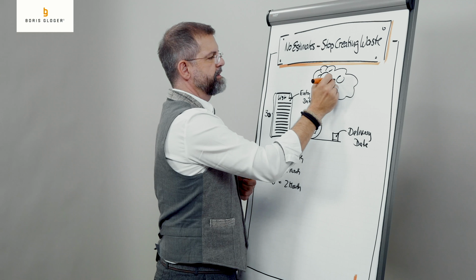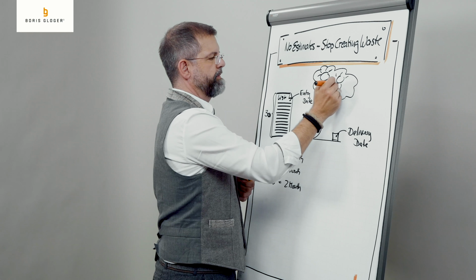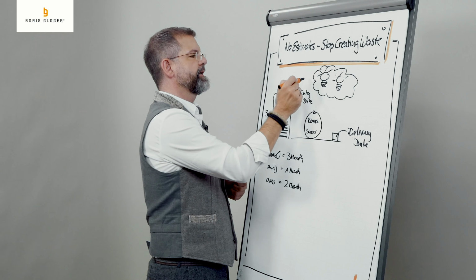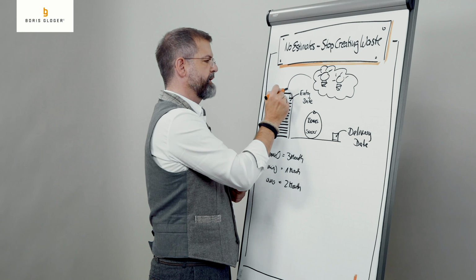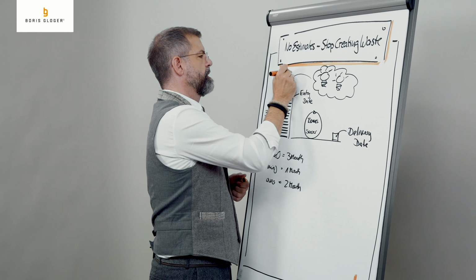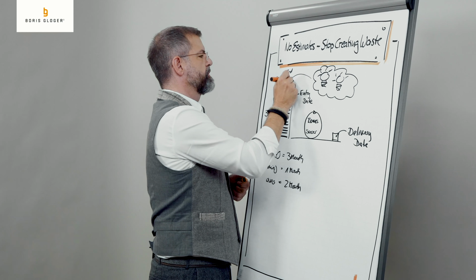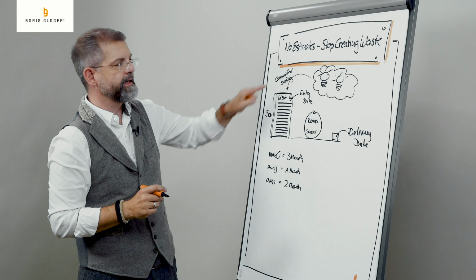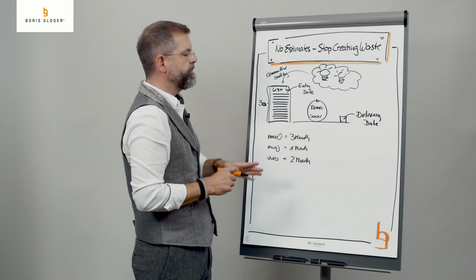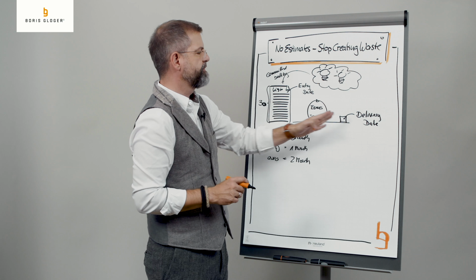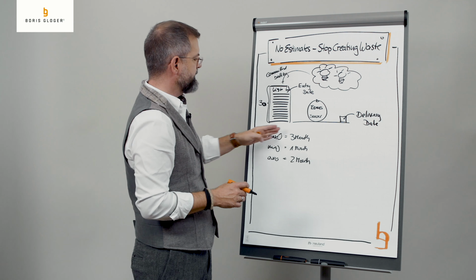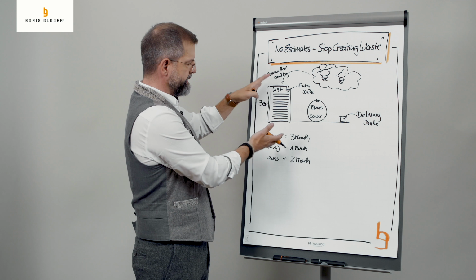And you have these ideas in your organization because people have ideas. That's usually thousands of ideas. But what we create is a so-called "now" list, a committed backlog, because whenever we put something into that list, it means we really deliver it. These are still only ideas. And you can only put something into that list when you have already delivered something out of that list. That's the basic rule.